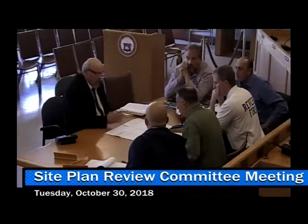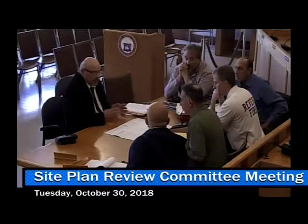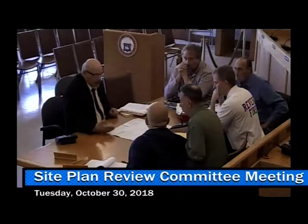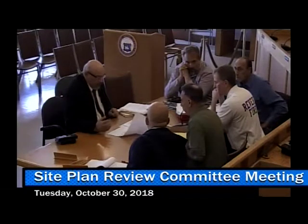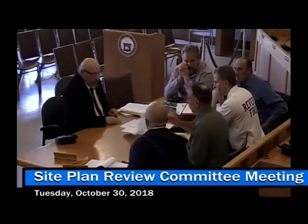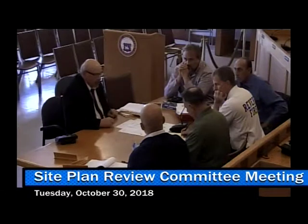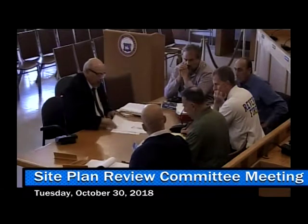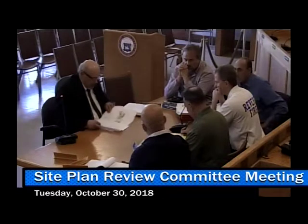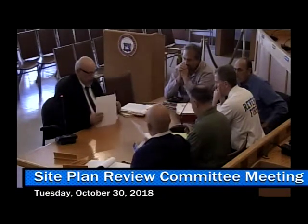I wasn't sure, we currently have a continued hearing with the ZBA, but didn't know if we can just amend it or file new. It'll be a new filing. We'd have to issue a new denial letter on this. I've uploaded both of them. But we will withdraw that other filing and hopefully replace it in time with this one. We're meeting late in November. Okay, all set. Thank you.